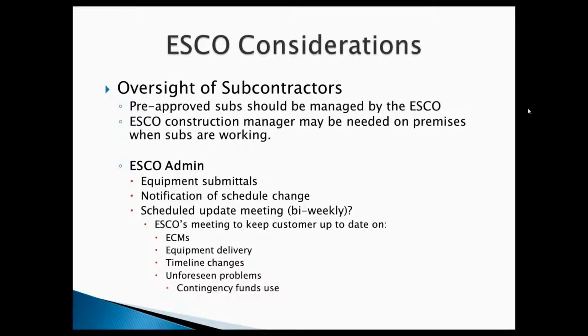The ESCO is to schedule update meetings. The customer needs to be updated as you go through the process of construction. Biweekly is a good guideline. There are some weeks that you won't need to be updated, that things are going fine. We haven't finished the ECM yet, but we're still working on it. Can we do this next week or two weeks from now or skip this meeting? That's fine, but biweekly is a nice guideline.